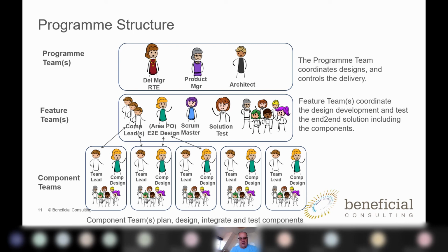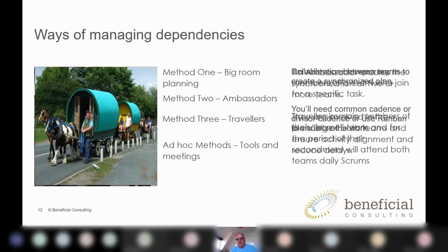So you're going to have to think about how you would coordinate that team. You'd have to define core working hours and all of those sort of things, and that has to be part of your design, right? Because if you just let that happen by chance, then things will be out of control. So alternatives to everybody being in the same space.